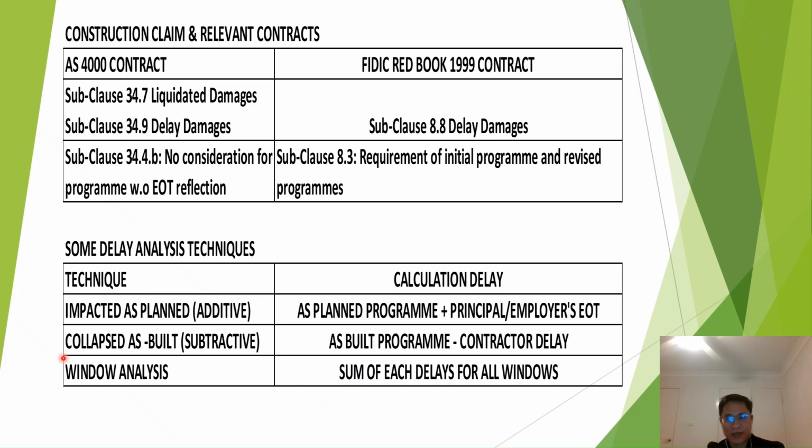And the second technique is collapsed as-built. The theory of this technique is based on an as-built program. An as-built program is built on the actual tasks plus the contractor delays and the principal's extension of time, which means we reflect our real program in the construction project when it's finished.